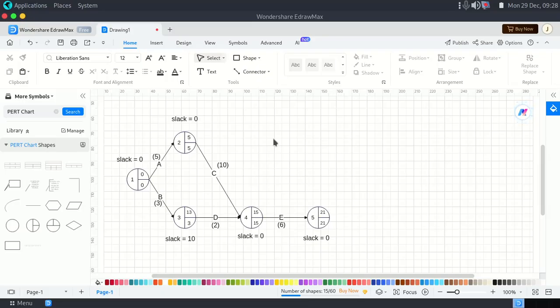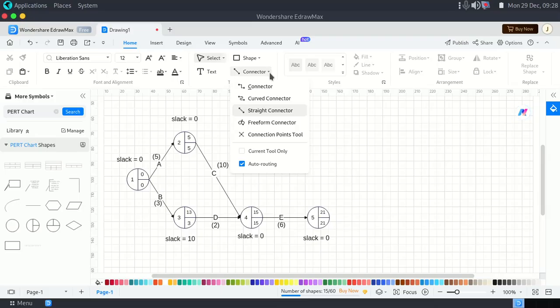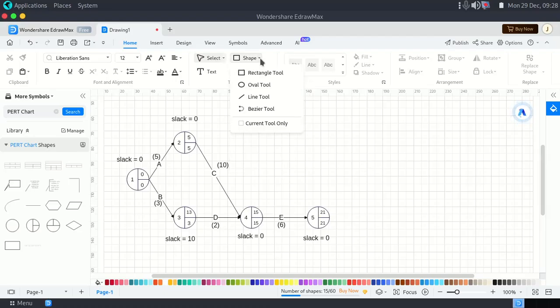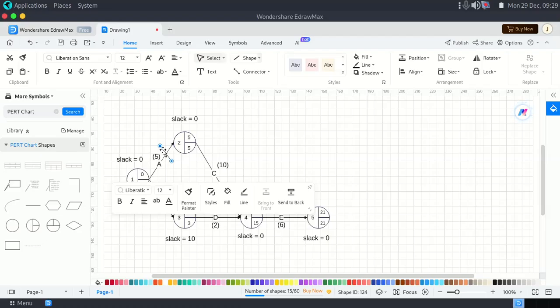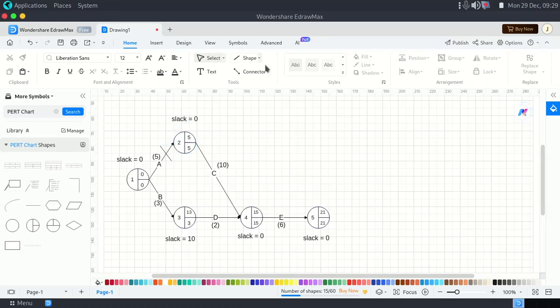Okay, before we even define it, how do we calculate or find the critical path? Since we already have our slack, we can say a critical path is any path which has a slack of 0. Okay, we can see that this node, which is A, has a slack of 0. So we are going to represent this, we are going to do this here.